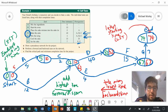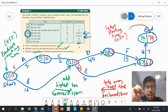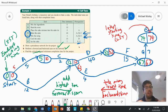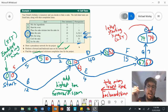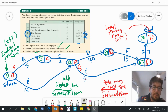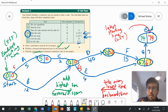We have now performed a forward and backward scan on the project, completing parts A and B. The critical path is the sequence of events that must be completed on time in order for there to be no delay to the overall project. You identify the critical path by looking for the sequence of bubbles where the earliest starting time equals the latest starting time — where the numbers on the left and right match up. Look: that's the same, that's the same, that's the same, that's the same, and that's the same.